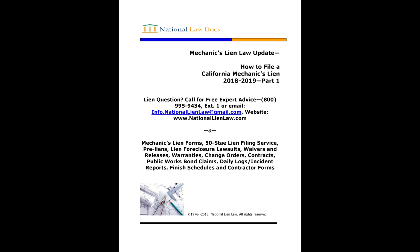You can file a lien if your contract is either verbal or in writing. The statute of frauds, which requires certain contracts to be in writing, does not apply here. And the Uniform Commercial Code is also inapplicable because you are providing construction services and not simply goods. In other words, you are providing both materials and labor. But if you are solely a material or equipment supplier, the UCC does apply, and your contract or purchase order should be in writing. The big exception